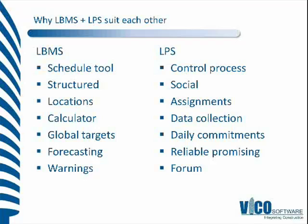The scheduling tool does have a controlling mechanism, and the controlling process from the Last Planner side does have scheduling theory behind it. But it's the social process from the Last Planner system that enables us to make better use of the structured nature — to record those social commitments, structure the data better, and analyze that information within one repository.